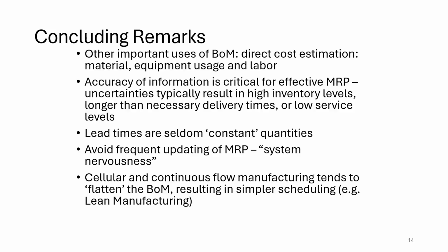And let's say that the lead time for the tires to get manufactured and shipped to us is 2 weeks. But now imagine that a storm hits the road, and because of that, the lead time has shifted to 4 weeks because of the storm and difficulty in transportation. So the lead time has been increased, and the MRP must constantly be updating itself on a real-time basis to show this increase in the lead time.